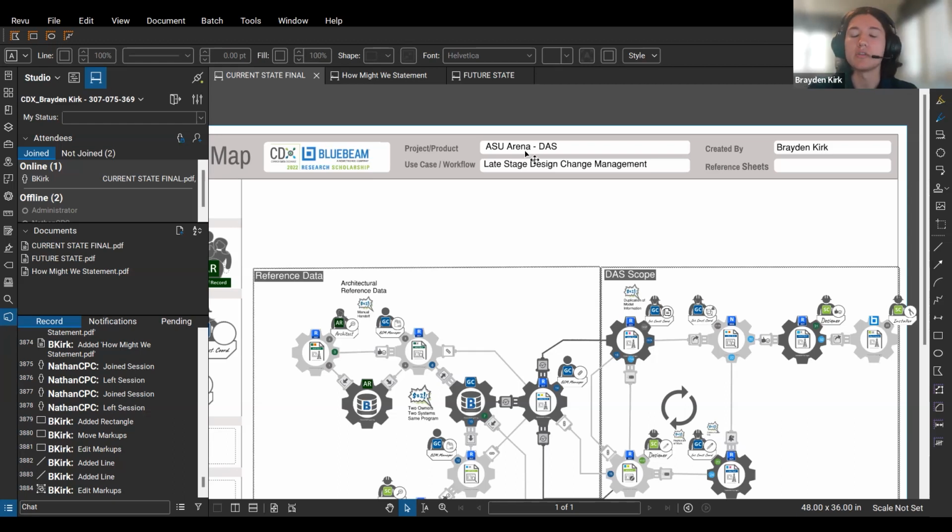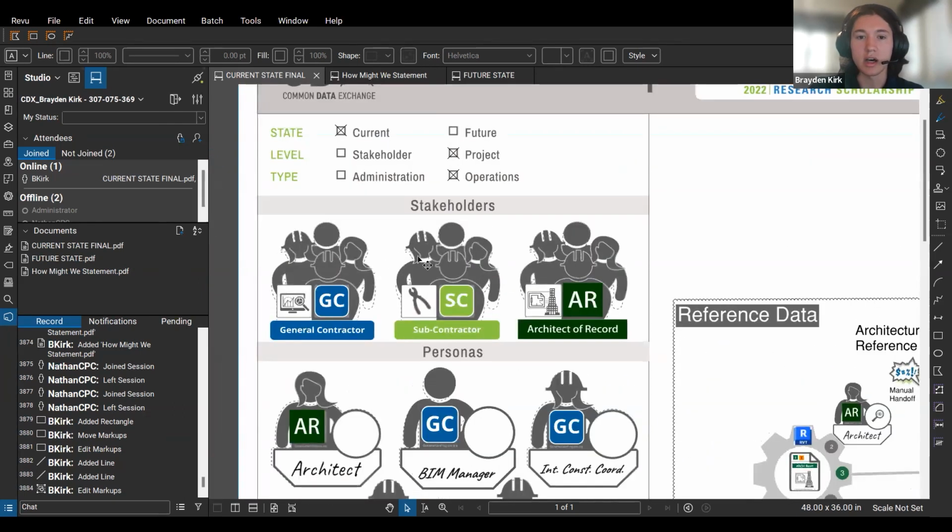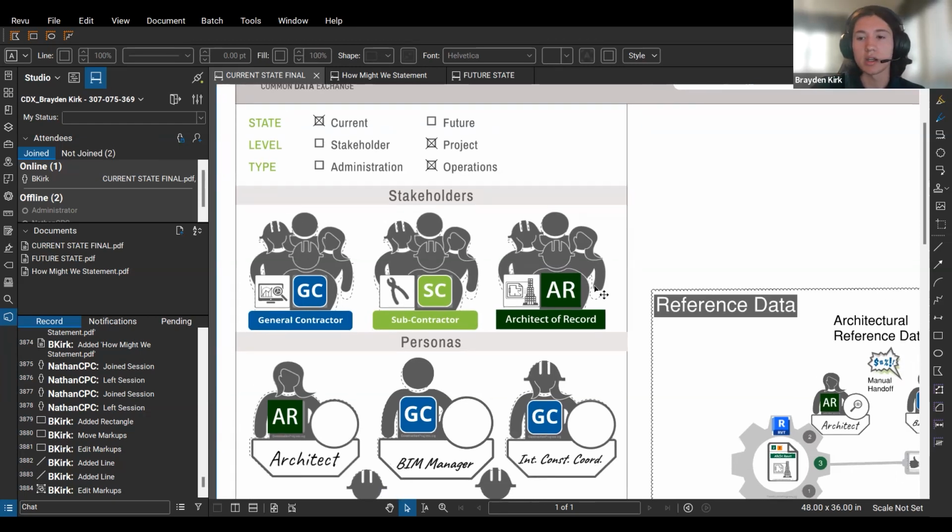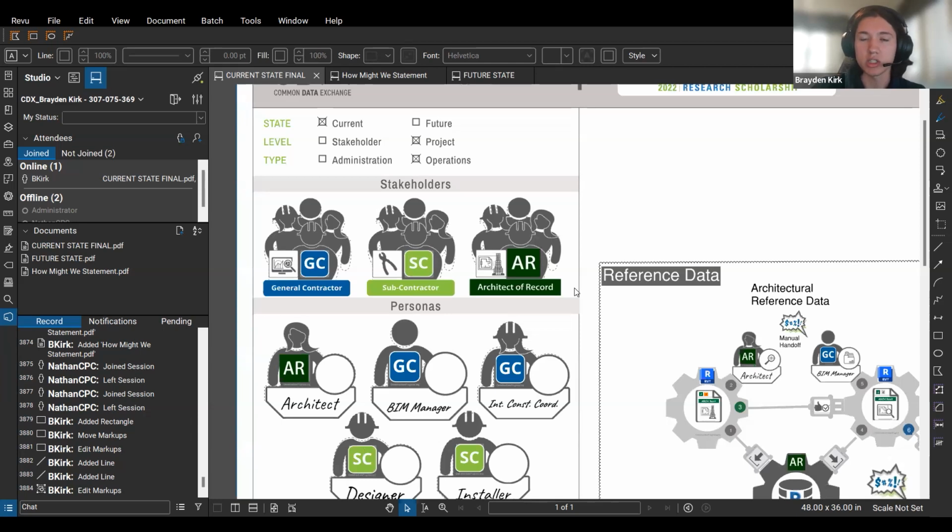So this utilizes a lot of existing information from the architectural side or trade side that is already installed or being installed in order to coordinate this scope. Contractually speaking, going into the stakeholders, Henderson, our subcontractor and designer for the DAS, was delegated to do this portion of the design. Mortensen dealt primarily with aggregating and coordinating that model information to make sure that the design worked well with the other scopes of work. And then the architect of record was there to provide that information initially for the project, and then also as a final approval along with Henderson.